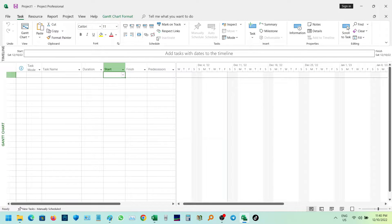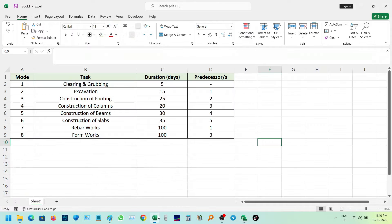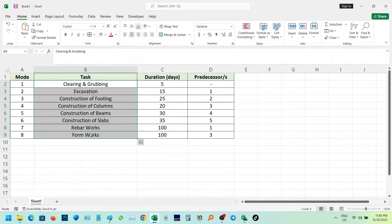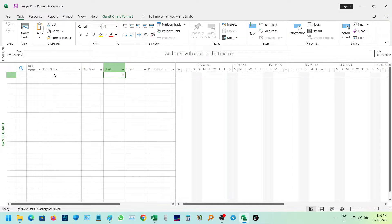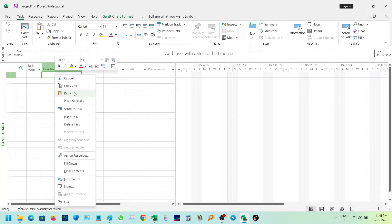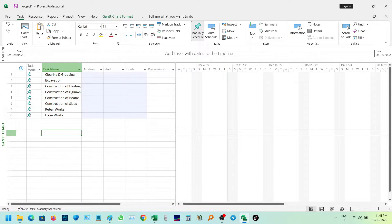From the Excel data, copy the column of tasks to the task name in MERS project. Then copy the corresponding durations into the duration column of MERS project.